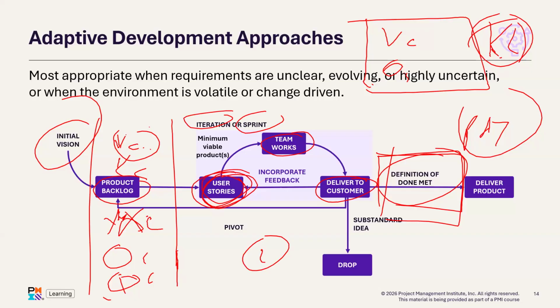So the first 2 weeks, the team will pick VC. They will determine the specific task that needs to be performed. They will determine the estimate of each of the tasks, and then they will assign responsibilities for each of the team members to perform VC within 2 weeks. That period of 2 weeks, whilst the team work to complete VC, is what we call iteration.